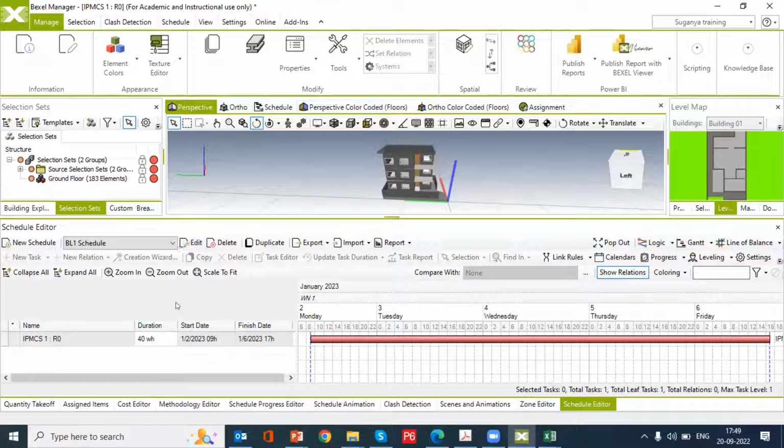In project management, we have five process groups: initiation, planning, execution, monitoring and controlling, and closing. Usually schedule creation is done in initiation and planning, starting with a high level schedule using summary or milestone level. Then a detailed level schedule will use activities or tasks. Then resource management, baseline setting, actuals or progress updating, tracking, and report generation. These things will be done in the 4D BIM portion.